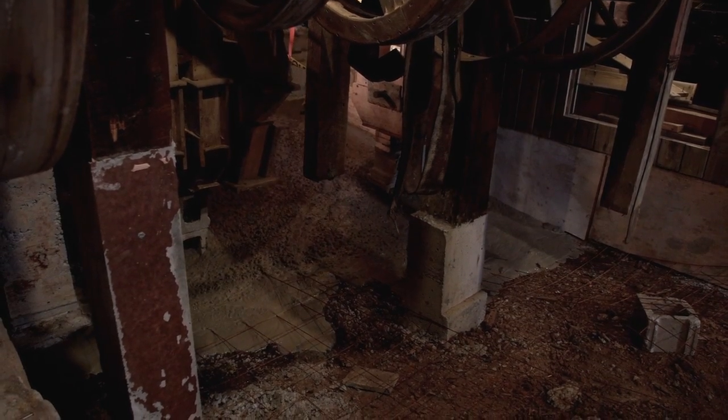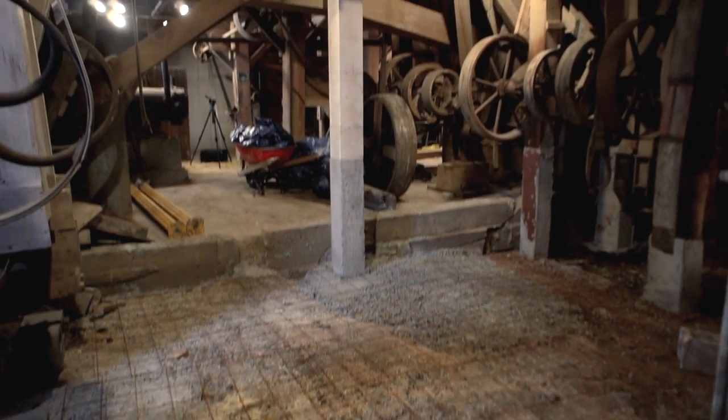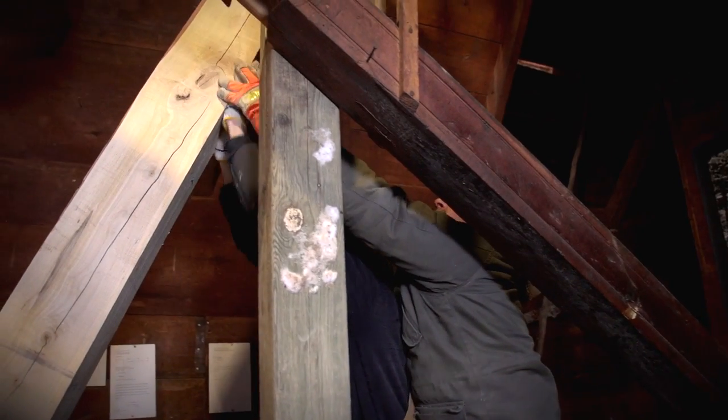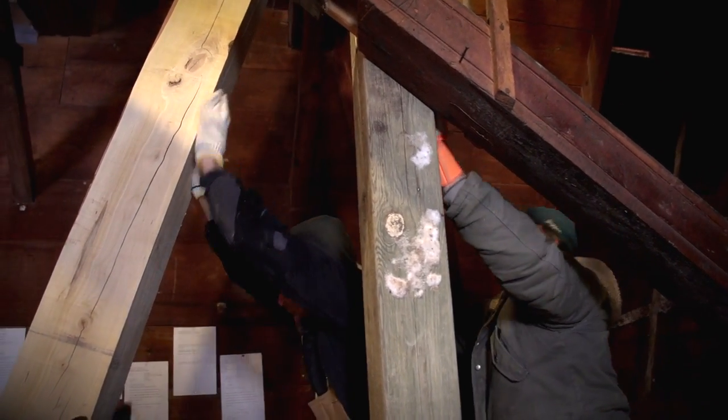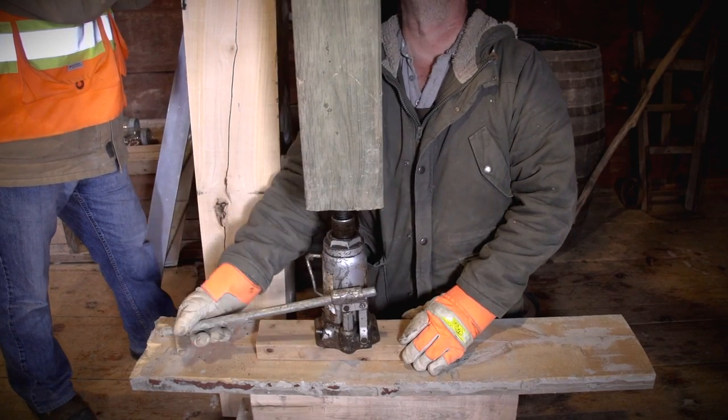But as we fill it up and make it structurally sound, we've found the proper admixture of today's technologies in order to make that happen. Once we get the basement poured back in place and we get it secured and tight and put some shores in, then we move up to the next floor to put in our pillars, which is our old rough timbers, like 8x8s and 10x10s, which you'll see when you get there, that supports the floor systems.